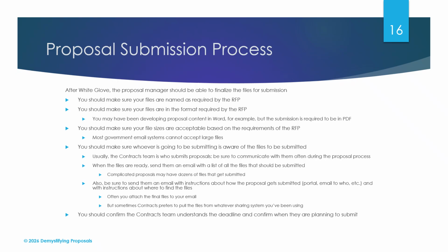You should make sure whoever is going to be submitting the proposal is aware of the files to be submitted. Usually, the contracts team is who submits proposals. Be sure to communicate with them often during the proposal process. When the files are ready, send them an email with a list of the files that should be submitted. Complicated proposals may have dozens of files that get submitted. Also, be sure to send them an email with instructions about how the proposal gets submitted. Is it a portal or an email, and to whom does the email go? And with instructions about where to find the files.